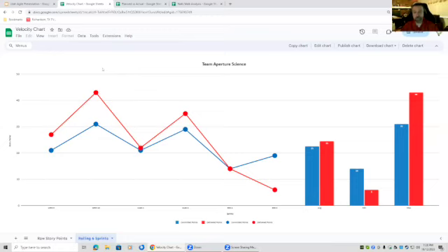I appreciate that. And yes, looking at this chart, the main reason that the Scrum teams look at this chart is when they're in sprint planning. We're planning a new sprint. How many story points do we think we can get in this sprint? Outside of that, they may not look at this often during the sprint or at all. So Mike's points are valid.